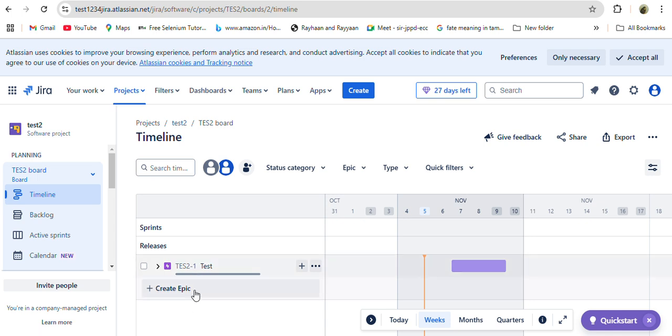Epic is nothing but the major functionality. For this example, when you take a home page and it contains login functionality, we can call this functionality an epic. Also when we go into shopping carts, we have a payment method. That payment method is called an epic. And inside the payment method we can have credit card or bank payments, that is called stories. Each of those functionalities could be called a story.